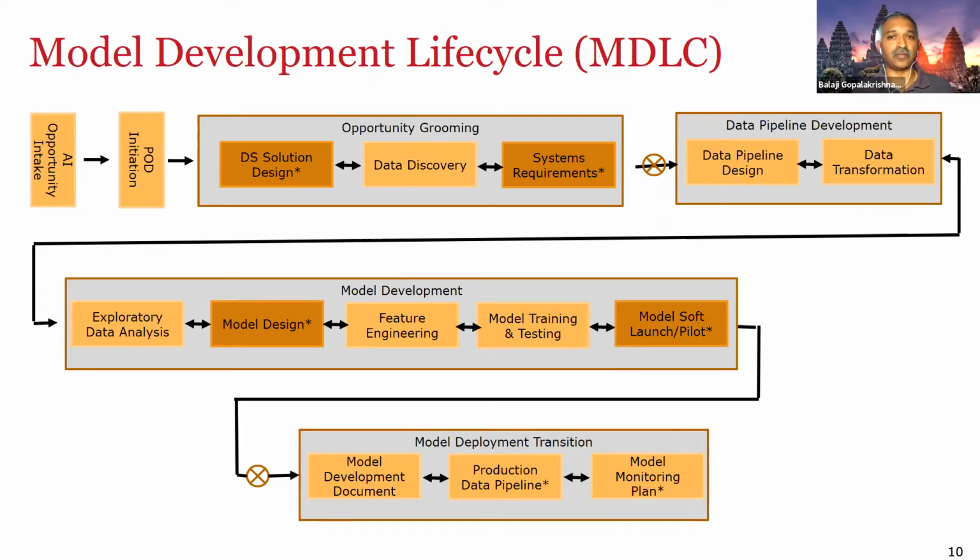And only then we can say it's successful for the business, right? The model can be successful, but if the strategies are not working, then the net result is zero. It's not going to work. Now, it is very prudent to release the model in a quote-unquote limited fashion without putting the model in full production, because putting a model in full production can sometimes be super expensive. And so from a business standpoint, it makes a lot of sense for them to take the model results and test their strategies and determine if it's working before they put the model in full production. So that is the spirit of what model soft launch is all about. Okay.